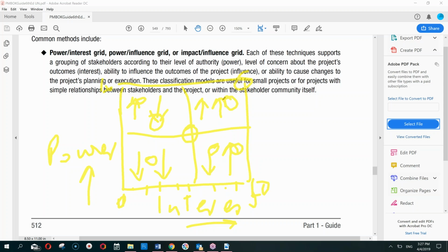So all the progress going on in the project, if you start informing the bank manager all the time, he will be very much disturbed. He doesn't want to go into those details. He just wants to know certain things. How soon are you going to pay my loan back? So that could be reported to him in a monthly or quarterly report. He needs nothing more. Therefore, because his interest is low, his reporting requirements would be much lesser.